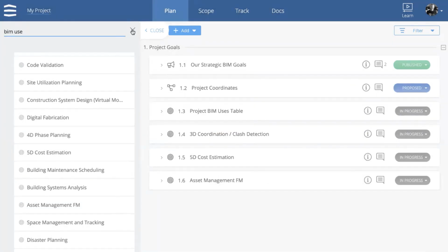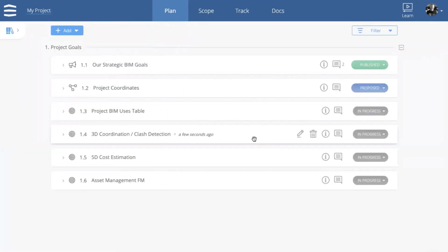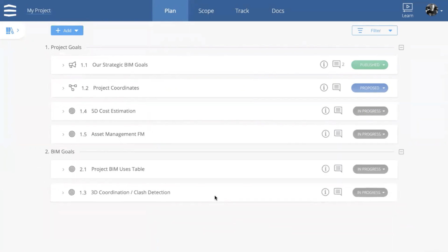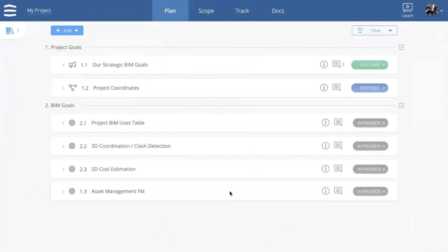Before you get to this point in discussing, you want to make sure that you're aware what these BIM uses are and what they're going to accomplish and what they require as well. So we have the templates available, but if it's not something that your company could provide as a service, so say you're an architecture company, you wouldn't want to promise structural analysis without getting the right team involved. Mm-hmm. So definitely have those lists of services that you could provide on your own. And if they'd want other services, then that would be something that you clearly define as someone else's responsibility. It could be an extra cost when getting those teams involved too. So definitely have your list and separate the list that could potentially be from another external team.